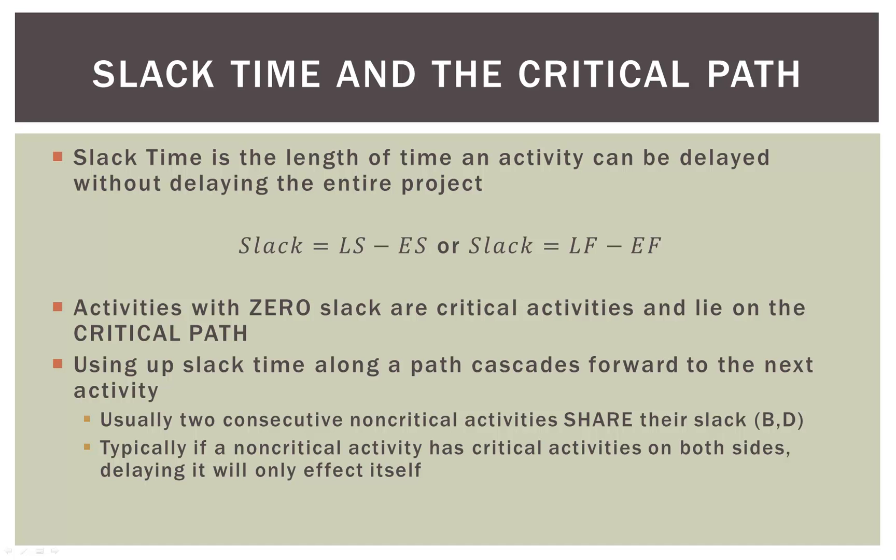That's why they're called critical. Now if an activity has some slack time, it can affect the activities next to it — it's kind of like slack in a rope. If you pull one end of a slack rope, it pulls the entire rope tight. So if we have two consecutive non-critical activities that have slack, they actually share that slack. If B and D each have one week of slack and they're next to each other, and we delay B by a week, D also loses its week of slack because it was dependent on B.